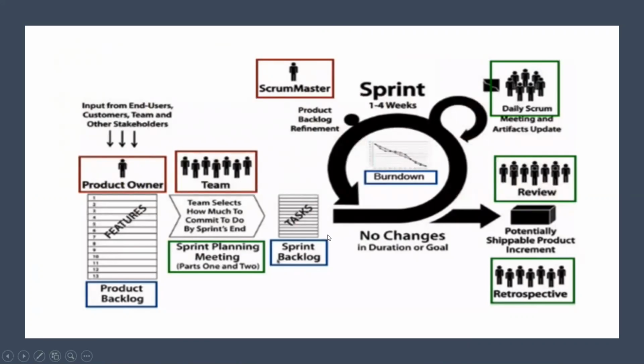Okay, this is the sprint backlog. The team creates a task-level plan of how they will deliver. The team works together to create an initial assignment of tasks and compares the total estimated task hours with the total estimated available hours to make sure the commitment is reasonable. So everyone in the team takes part, regardless of experience level.